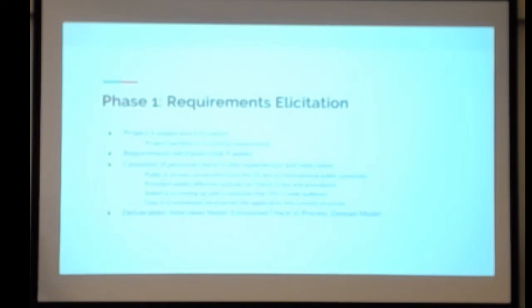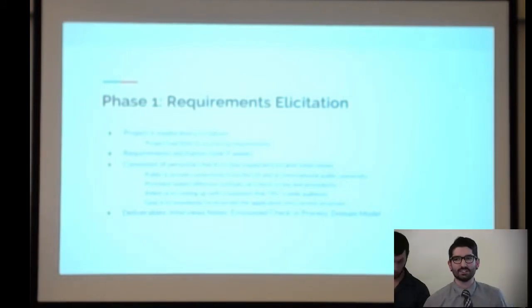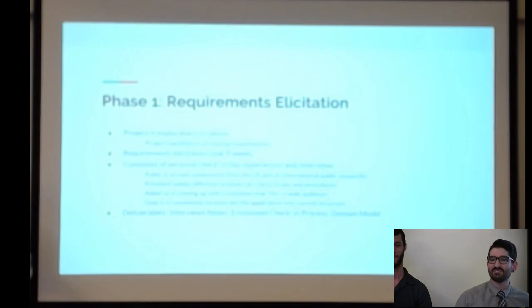So the phase 1 that we went into, which was requirement solicitation, just as a reminder, we didn't really get that many requirements. There wasn't a vision of what this project is to be. So we had to spend a majority of our time doing requirement solicitation. It actually took 9 weeks to do it. And on top of that, the requirements came from our personal accounts of what check-in day was, but it's been 6 years for most of us, so we kind of forget a few things.